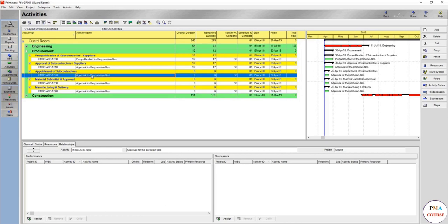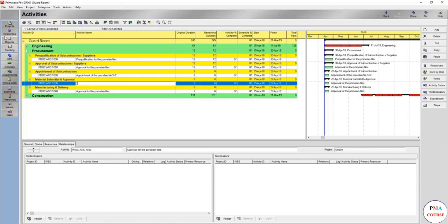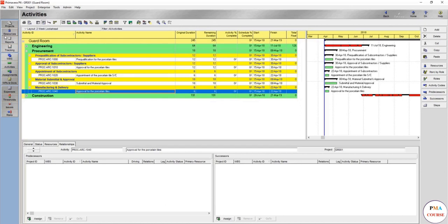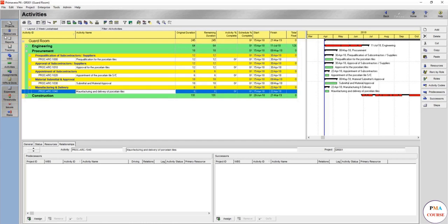We name the activities clearly: approval for the porcelain tile subcontractor, appointment of the porcelain tile subcontractor, material submittal and approval for porcelain tiles — giving this 18 days to cover the whole process of submittal, approval, and resubmittal. After getting approval, manufacturing and delivery begins, including custom clearance and everything if manufacturing is outside the country. Manufacturing and delivery of porcelain tiles gets about 4 months — 4 months at 26 working days per month is 104 working days.